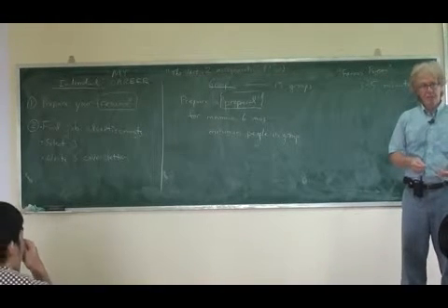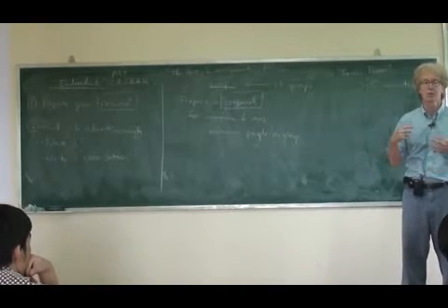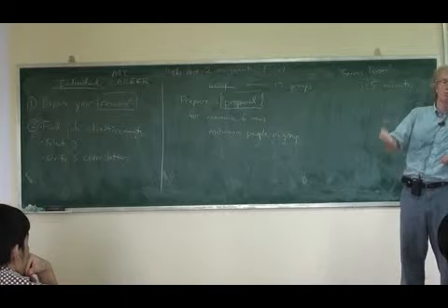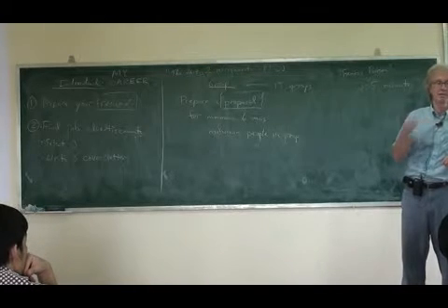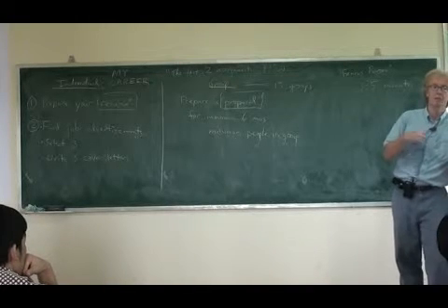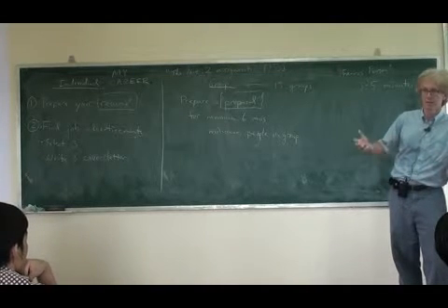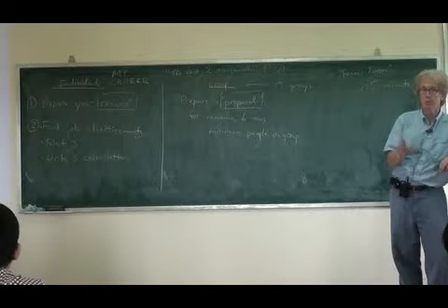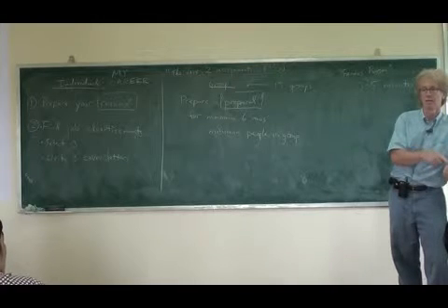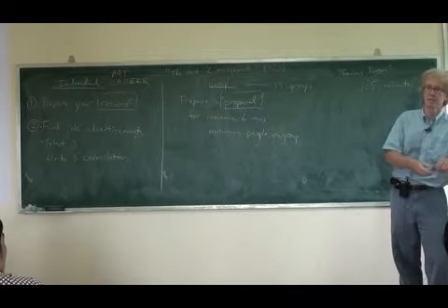In academics, it's very common for professors to have research contracts to work on with students. But professors also have to teach classes, and maybe they're on a committee or something like that. So when I'm a professor and I propose a research project, I might propose that I'm going to spend 10% of my time on it, or 20% of my time. So it only has to pay for 10% of my salary or 20% of my salary, because all day long I have other stuff I have to do, right, like teaching. But in my proposal, I might propose to pay 100% of a student assistant's salary. So the students can work on the project all day long, and I will help them 10% of my time or 20% of my time. Okay?